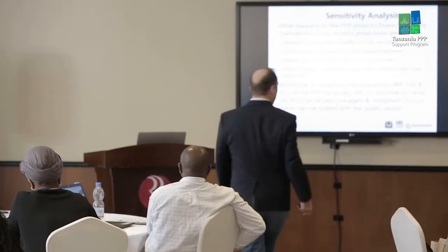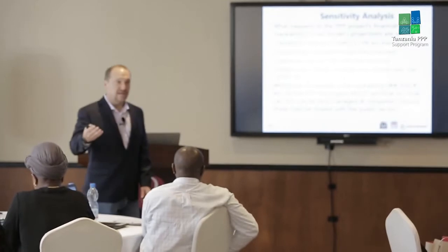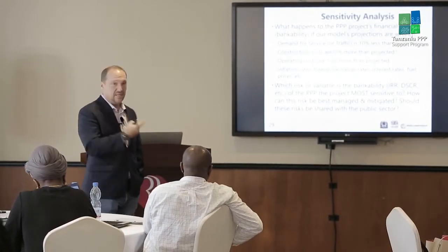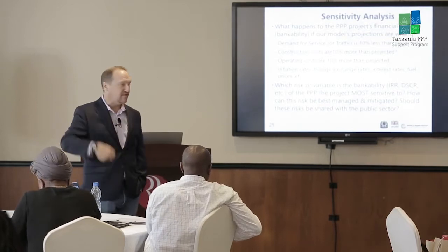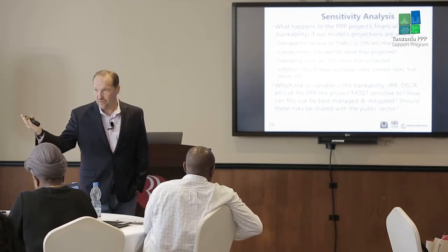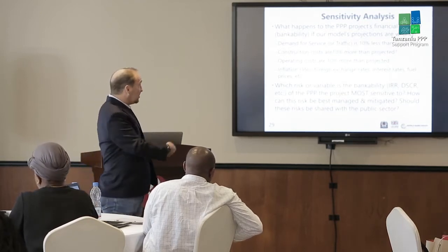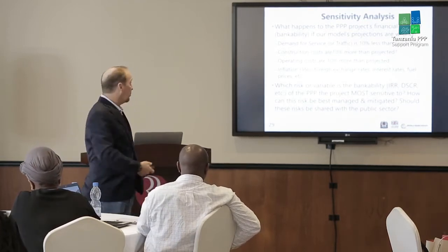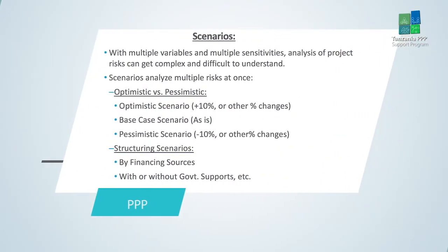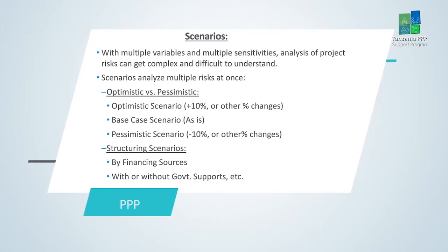So you did examples of this. It is answering the what if question. What if the level of revenue or the demand or traffic for the project drops by 10%? What are the results? What if the construction costs are 10% higher? Or what if the operating costs are more? Now there's a difference, as I'd mentioned, between sensitivity analysis and scenario analysis.